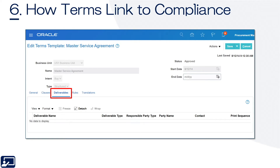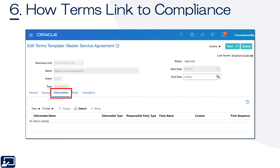So how do terms link to compliance? There are really three types of terms: you can either deny something, affirm it, or just state it. Denying something is why you sign the contract — you can't present the counterfactual. But when you assert or define something, you may put a deliverable. For example, if anytime we make a change to a project we have to fill out a change management form, that's a case where I can put a deliverable, have you acknowledge it, and even attach a copy of the form. That could become an external deliverable the supplier is supposed to complete as part of execution plus 30 days. I could also have contract obligations, a shutdown process, and internal resources responsible for providing deliverables on performance against the contract. Deliverables are just ways to link compliance tasks to a contract.